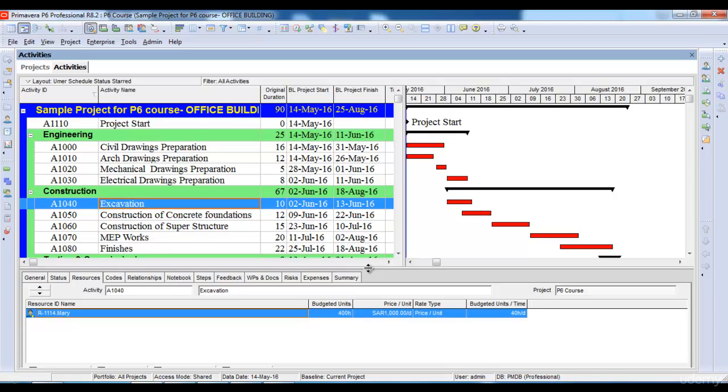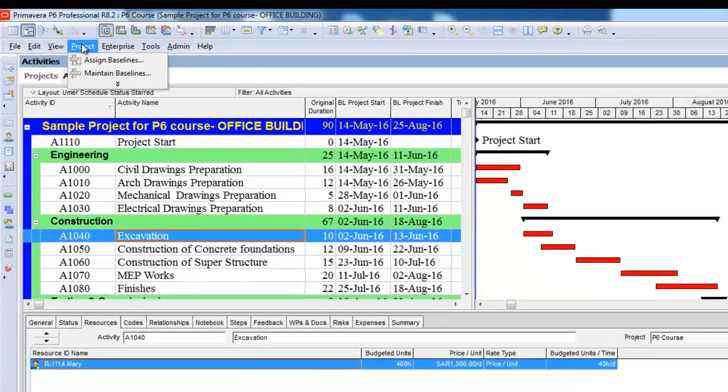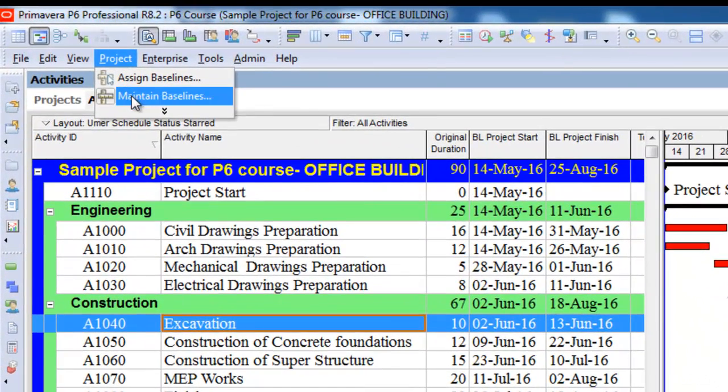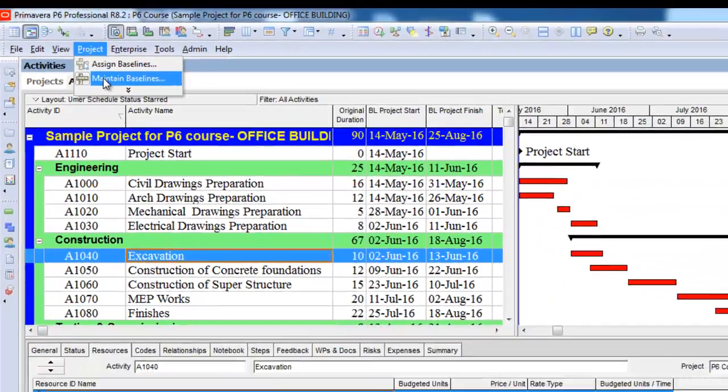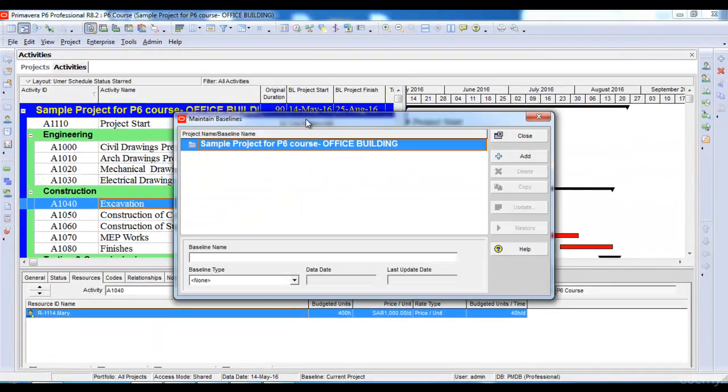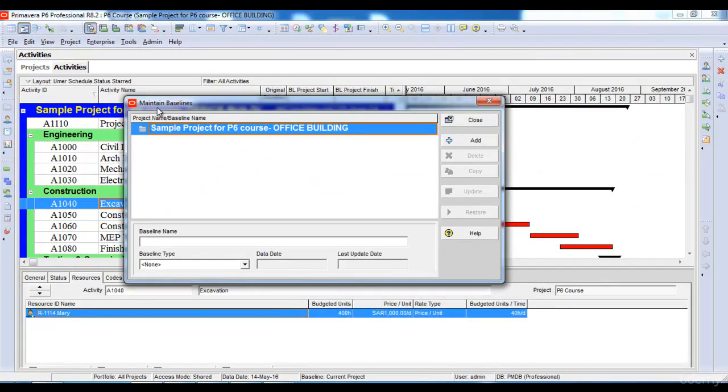In order to assign the project baseline we need to maintain a baseline first. We will go to the Project option here and then select Maintain Baselines option. It opens another window, the Maintain Baseline window, and I will click the Add option here.